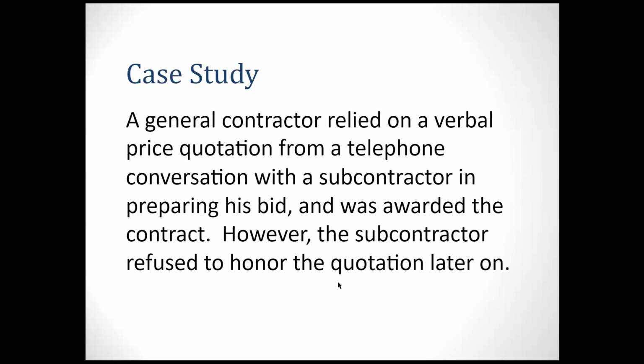Can the subcontractor refuse this quote? It's not in writing. It's not binding. It's not in writing, right? So definitely they can refuse. So how to prevent this? If in the future this happens to you, in this condition, how will you do it? You write a contract. You will write an email, a follow-up email, right? Or you will do a phone recording, right? Just make documents. You have those conversations before, but the best choice is writing it up, right?